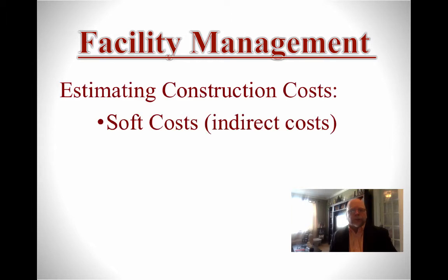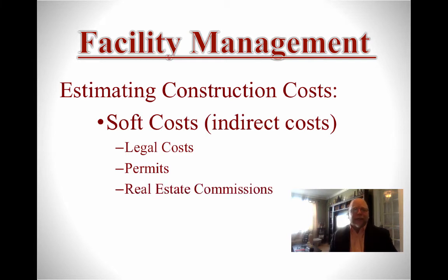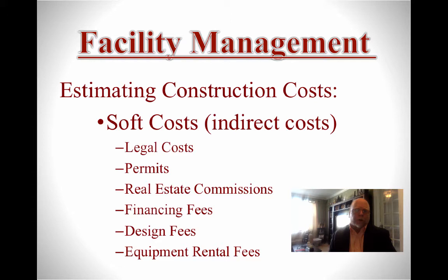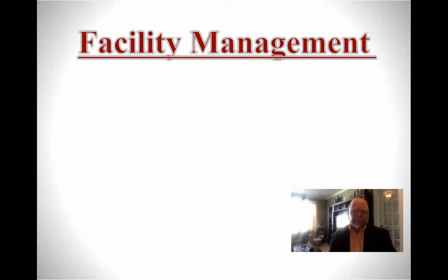And those costs are going to include legal costs, permits, stuff like that. Real estate commissions: if you buy the land, the real estate agent's going to want some money. Financing fees: if you get a loan, you're going to have to pay some financing fees. Design fees, architectural, stuff like that. All those are soft costs, right? Or indirect costs, because they happen before the construction begins. Any permits, real estate commissions, financing fees, design fees in that area.